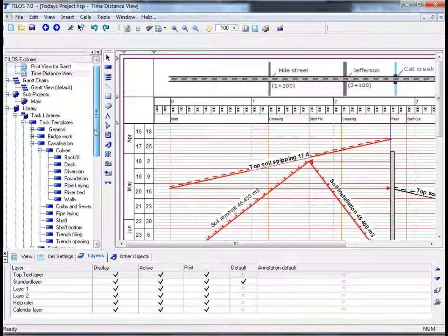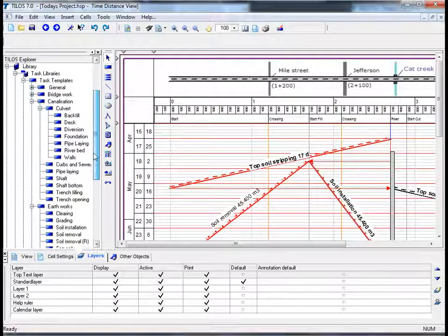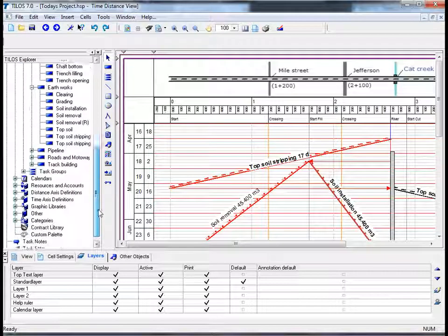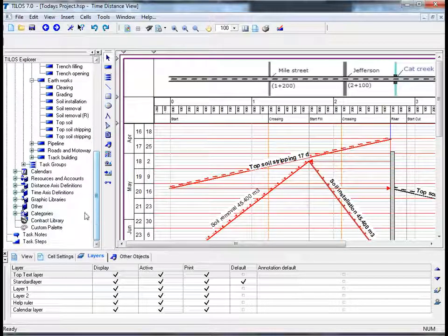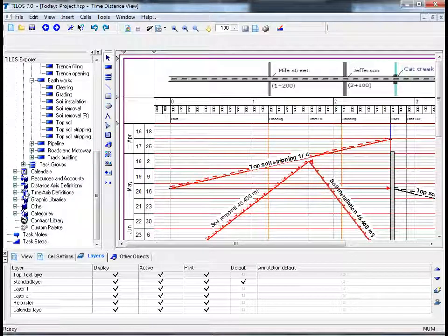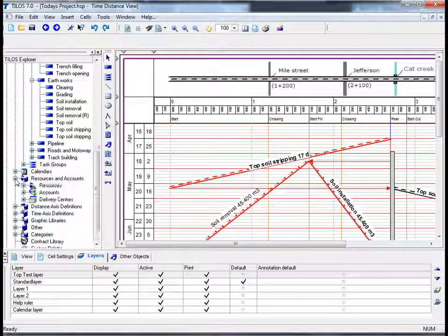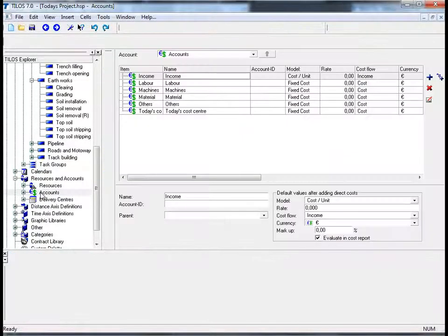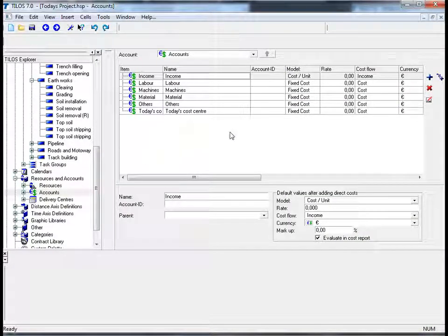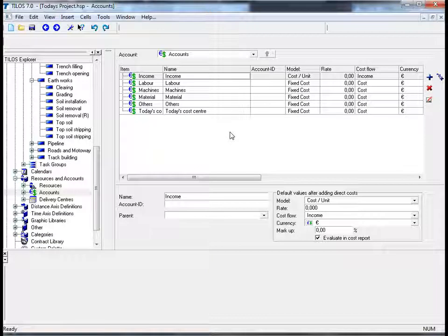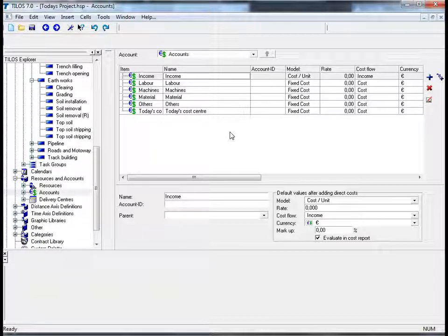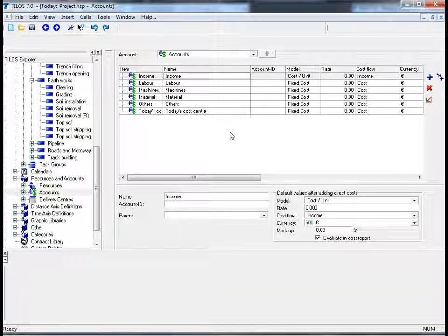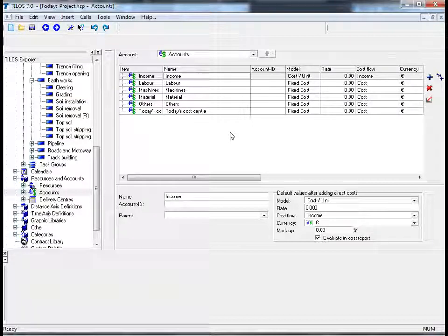By clicking on the scroll bar and dragging it downwards, and by clicking the plus symbol next to resources and accounts, and double clicking the account field, you can see here in the middle of your screen the Tylos library contains a list of cost centers with which you can split the project costs into separate accounts. The list of accounts can be customized to meet the specific project needs.